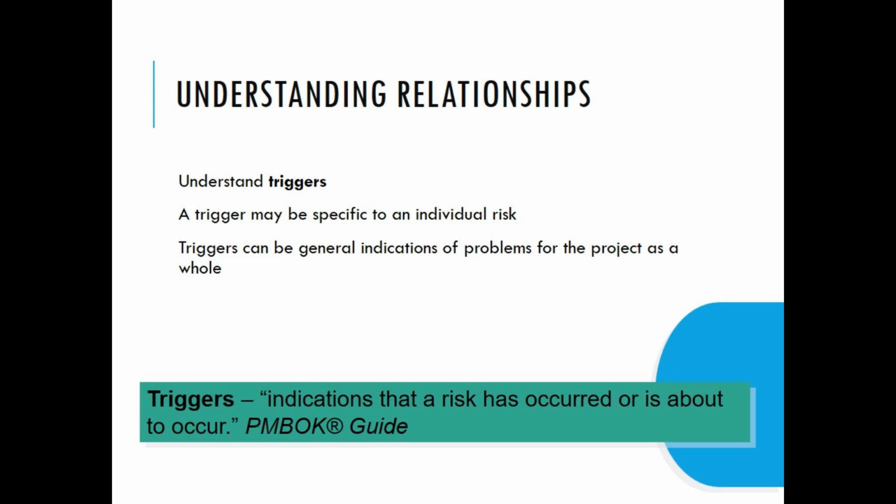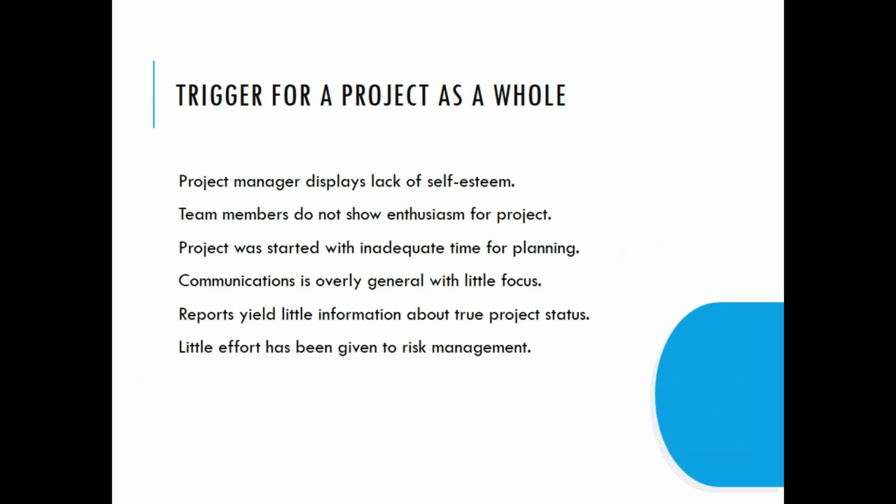Here, the fourth step, pricing the risk, is the step that quantifies the loss associated with the risk in monetary terms. A risk needs to be prioritized, differentiated, and responded to. We can't handle all the risks in the same way. We need to have a specific risk response plan for each risk.